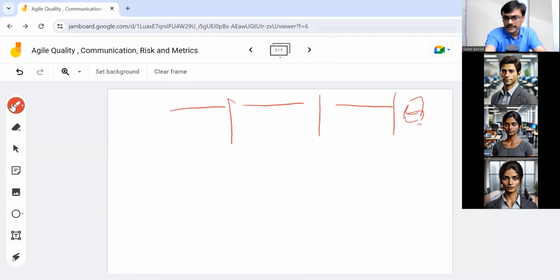Yeah, 1.5 months. That's the goal. That's it. Now I'm making three sprints, because the client, everybody, wants three sprints. In the first sprint, I'm planning all the design and requirement activity. In the second sprint, I'm planning development. In the third sprint, I'm planning testing and finishing it. Actually, that is not Scrum.